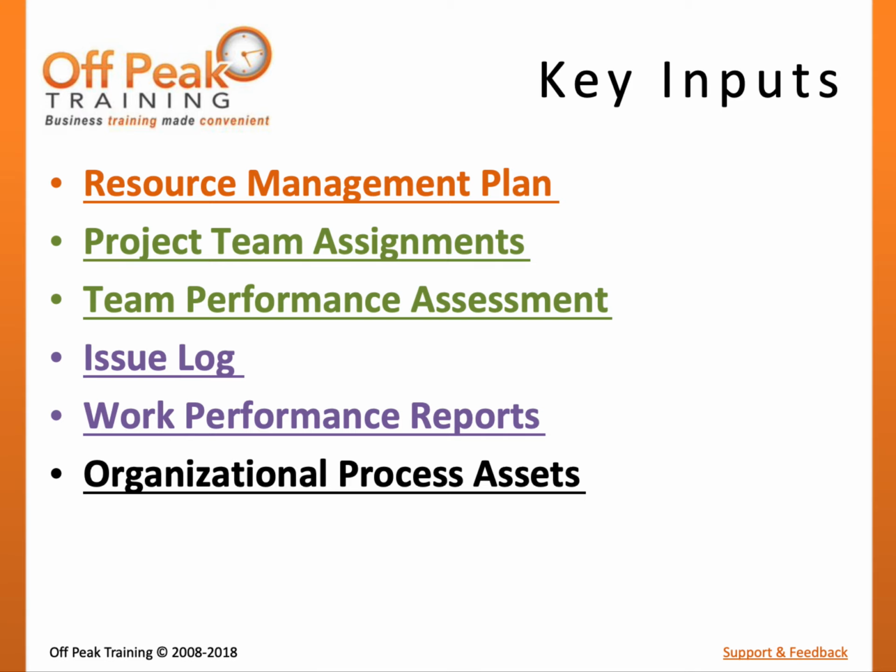An issue log may be used to document project problems, the person responsible for solving those problems, and how the issue was resolved. This helps ensure that issues are not forgotten or ignored and helps to capture lessons learned.